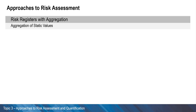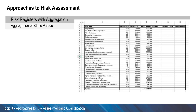Let's take a look at aggregation of static values. An example is given here. The impact on occurrence is multiplied by the probability of occurrence to give an average impact. Note that risks may also be assigned to categories — for example, geography, department, or related to a specific risk driver. This way, they can be aggregated and presented by category, as well as in total.